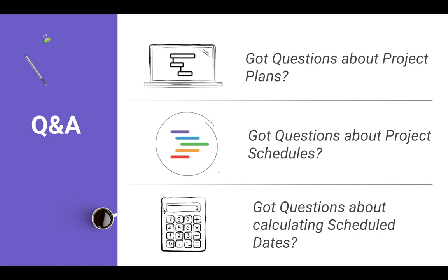Is adaptive schedule necessary in order to have dependent tasks automatically start? Adaptive scheduling is not necessary to have dependent tasks automatically start, Zachary. What is necessary is turning that auto start feature on. The auto start feature I discussed has three settings.